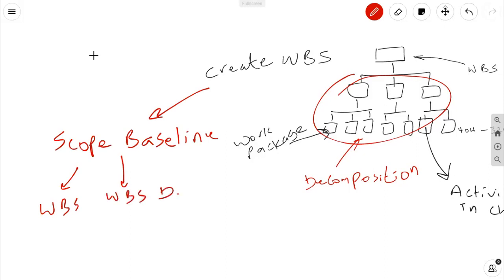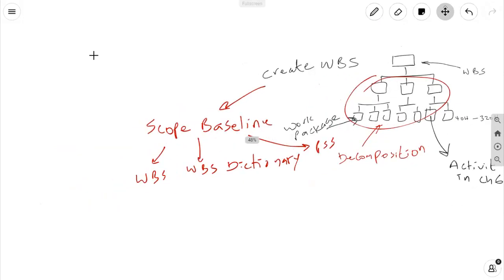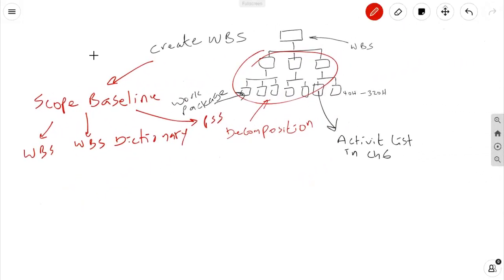WBS, a work breakdown structure. WBS is used to show a hierarchical breakdown of project deliverables into smaller components. Each descending level of the WBS represents a detailed definition of the project deliverable. Each WBS component is connected to a control account and assigned a unique identifier called a code of accounts. The WBS helps organize and define the project deliverables specified in the project scope statement. Any deliverable that is not represented in the WBS is not part of the project.